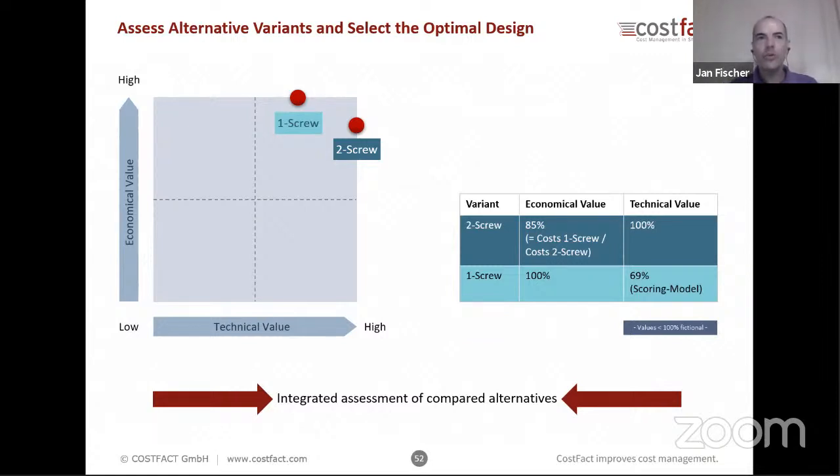but COSFACT allows us to enter everything in detail, to enter or to calculate variance. We can also work with uncertainty. That is something that is not shown in this presentation. If something is completely new, probably the uncertainty is higher, so you have to make assumptions. You might say, okay, I have this number entered into COSFACT, but it can be plus minus 20% in the end. COSFACT has a very sophisticated feature to address such uncertainties. You can work with reliability classes, and later you can make an analysis which shows you, well, your resulting cost is 120 million, and the prospective forecast error is plus minus 7%. That is also very helpful. Then you can decide, well, that is okay for the moment, or no, plus minus 7% is too much, and we have to go more into detail on the components and systems which are responsible for this uncertainty.